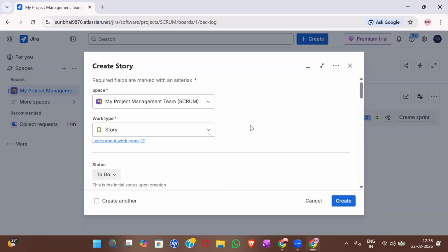Epic is nothing but a requirement that is huge, where you cannot complete that requirement within a single sprint. Okay, an epic is a requirement or a kind of need that cannot be completed in a single sprint. You will split down these epics into smaller parts, which are called user stories. Epics are cut down to make it simple and easy to work on in a single sprint, and those cut downs are nothing but user stories.